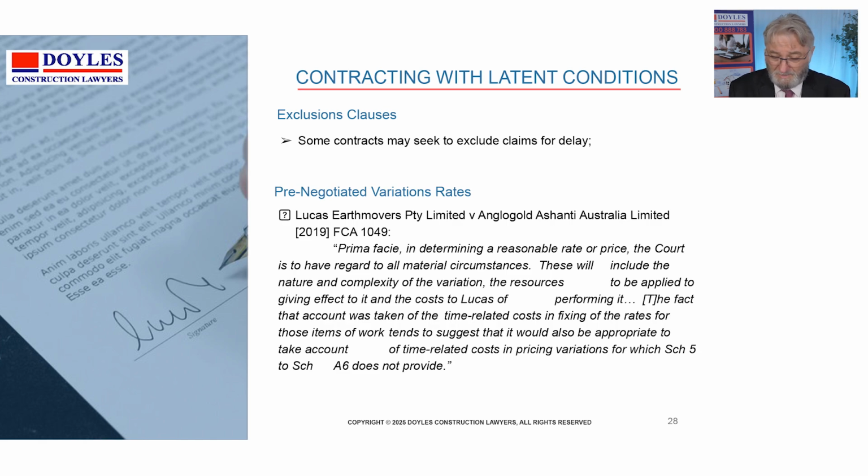procedures. But if you're asked to do some extra work informally outside the contract procedures, then the court might be prepared to say, we'll interpret the exclusion clause so that it doesn't exclude payment for the extra work. So there's a contest, a creative tension between, on the one hand, the court saying you've got to go through the procedures to get paid, the exclusion clause will otherwise knock you out of your claim, but if the exclusion clause doesn't, then recovery might be obtained.